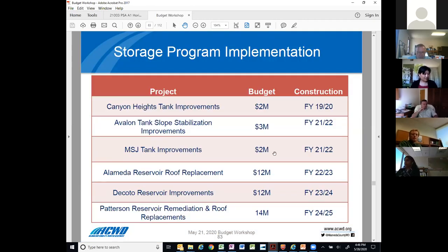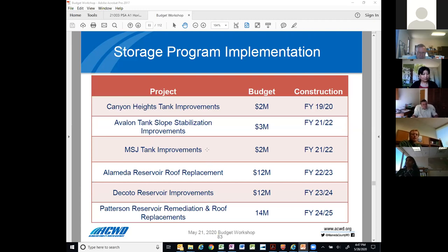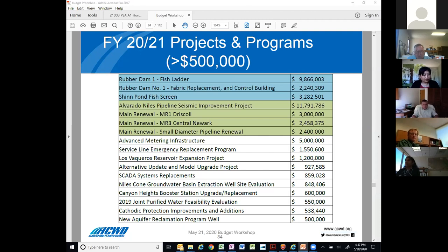This is our storage program implementation — another view of what projects are included in our storage program. We have one project that is close to completion in terms of construction and will go into service in the next few weeks. The other projects identified on this list have initiated design. The way the CIP is lined up, after completing the first phase of construction including fish passage projects, AMI will be moving into the construction phase, and these storage improvements are being designed to line up right after.